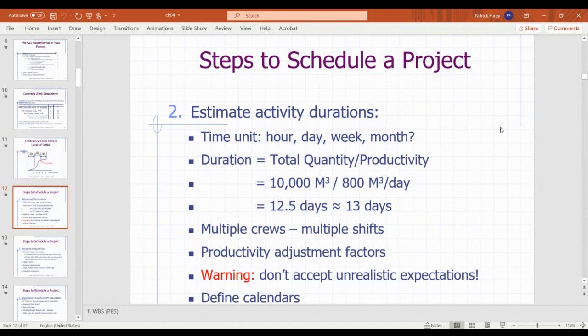That's where you just try to look for some history, talk to the foreman, talk to the managers of the contractors or the directors of the in-house labor. You get your best feel for your best estimate on how difficult it is to complete work in a certain area, and then you might assign a productivity adjustment factor. So to account for, in Chicago, a good journeyman might install 200 feet of pipe in a day. In the south of the United States or Canada, it might be significantly less than that amount.